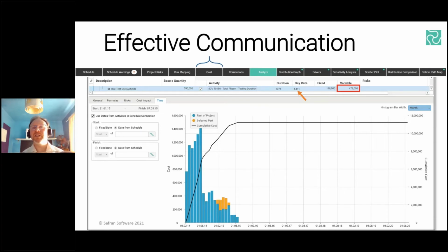And we can also see that because we've mapped this cost to a bunch of activities within the hammock, this cost is going to be incurred here within our deterministic cash flow profile, which you can see moving around with each iteration of the step through during the simulation. Or if you prefer, we have a probabilistic cash flow report, which essentially is a risk-adjusted cash flow.